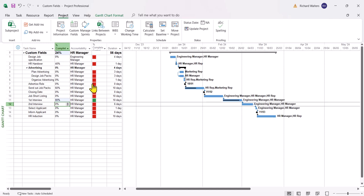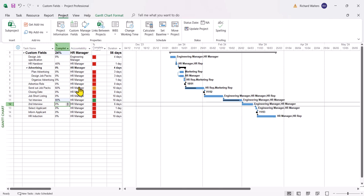So we can see the red's working for anything that's less than or equal to 40 percent. Then the orange for anything that is greater than 40 percent but less than or equal to 70 percent. And finally the green for anything that is above 70 percent. So this is the kind of way you can control project through different kind of indicators. Whether it be the example of a lookup field for the accountability or color coding for percentage complete control. But this completes the demonstration on the basics of custom fields. And there will be another video demonstration on custom fields with a more advanced way of working.